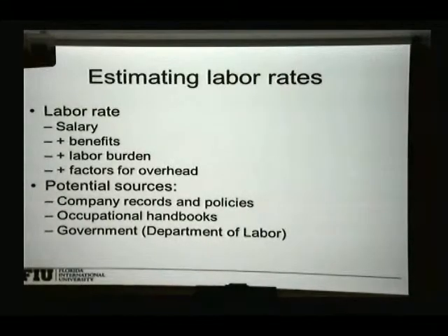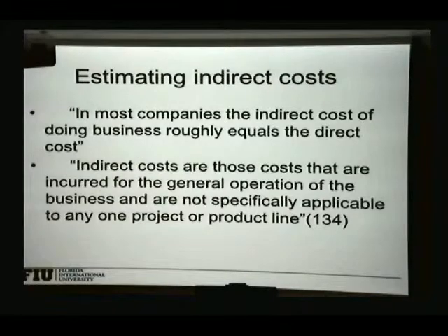labor rate also has burden cost in it. The benefits for the employee, overhead, medical benefits and so on, that you may have to pay if you have your own employees. Otherwise, it's just the labor rate that you pay to your subcontractor, right?